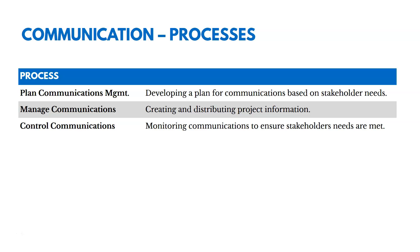With plan communications management, we're defining and determining what we need to communicate to our stakeholders and when — developing a plan for communications. With manage communications, we're creating and actually distributing that information; that's why it's in executing. We're sharing reports or whatever is needed. Control communications is when we're monitoring communications and adjusting them if needed to make sure stakeholders get the right information at the right time.